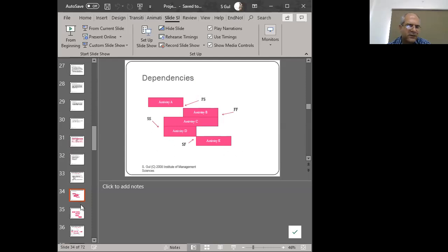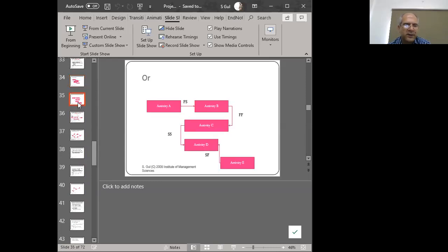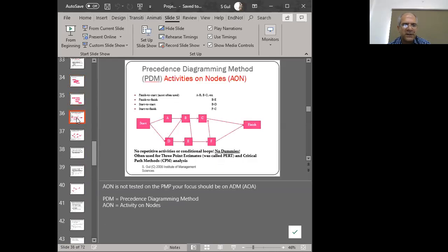And we also have a start to finish, and that is a ridiculous dependency. So we don't want to have that in our project. Rather, we want to resolve that into the FF or the SS. We don't want to have the SF dependency, so we'll try to convert it into one of the others. Right? Now, if we take our activities and put them on the network diagram,